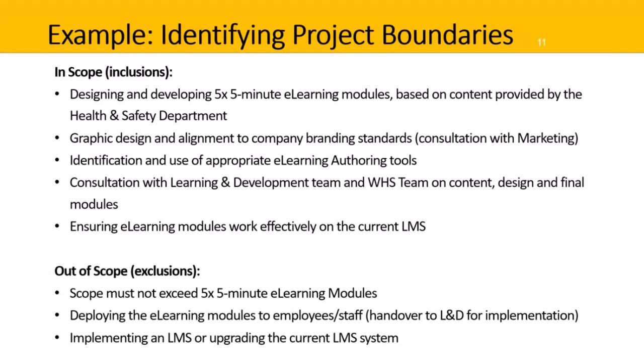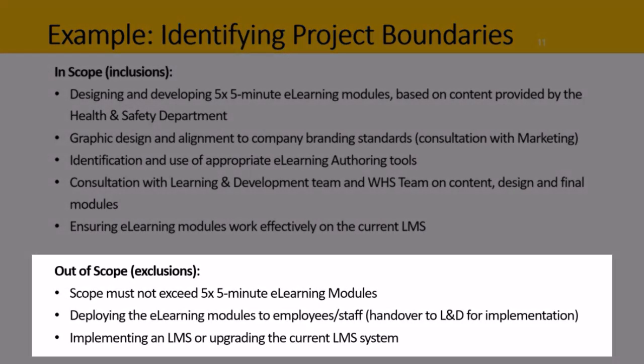Out of scope or exclusions, we can't do any more than 5 e-learning modules. 5 is the limit, so it must not exceed 5. And deploying the e-learning modules to employees or staff isn't going to be done by us. Learning and development are going to do that.